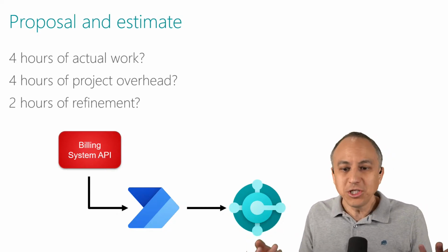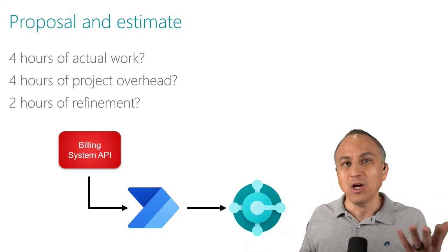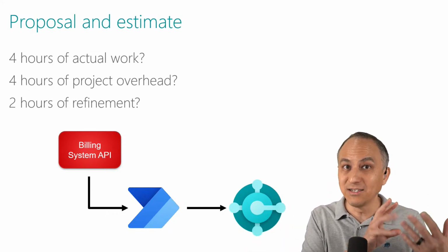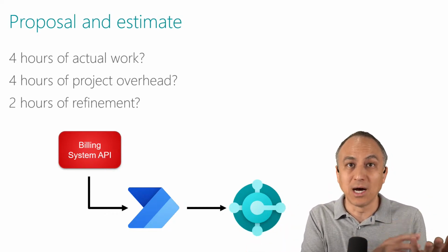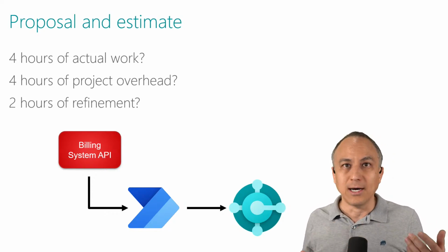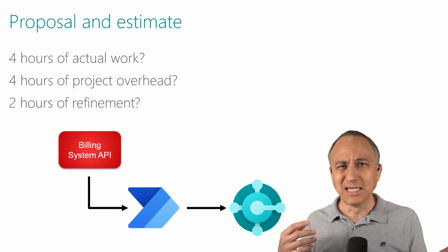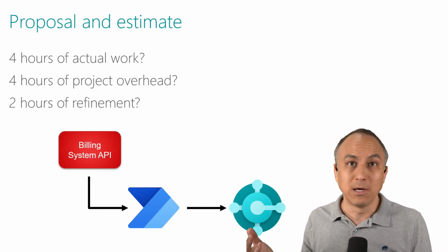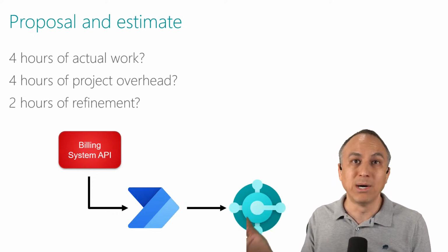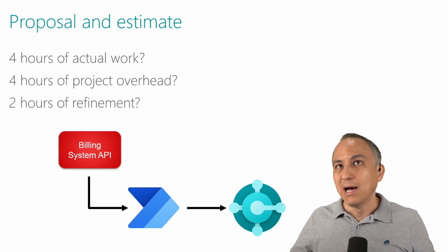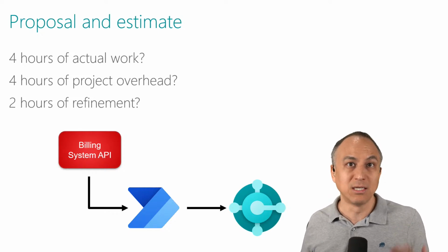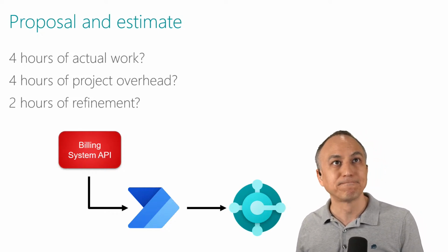So just based on experience, we're kind of in the 8 to 12-hour ballpark. Less than 8 starts to get kind of tight; you just don't have enough time to deal with changes or unexpected details. Above, say, 12 hours, and I don't know how responsible that is. Maybe you could propose it and just say, hey, we might not use it, but there you go. But I'm thinking, this is 10 hours. That's reasonable for this simple transaction, right?